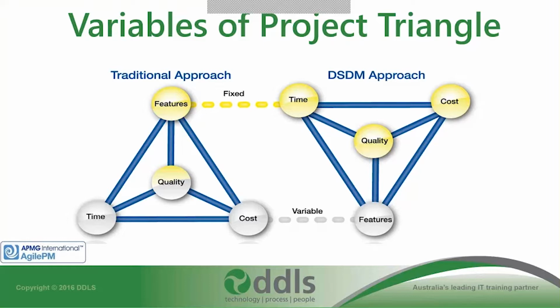What happens in Waterfall is if we run out of time or we run out of money, you ask me for more so that we can build to that scope. So you then go to me, Louisa, we need a little bit more time because it's been 6 months and we've only done 4 of the bedrooms, but we haven't done the study, for example. So you then ask me for more time or more money, because why? Your scope is locked down. You've already told me that is exactly what you're building me. So if you haven't finished it, you ask for more time and you ask for more money.